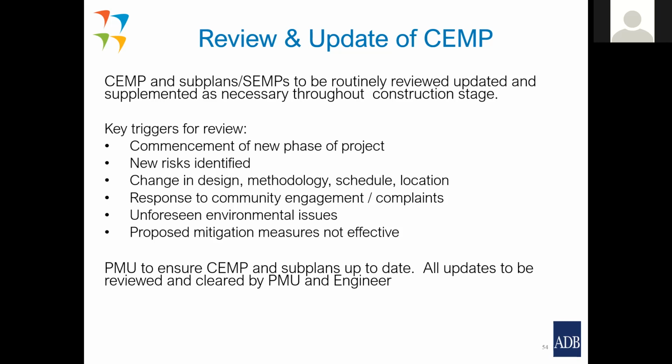So key triggers for a review of the CEMP would be commencement of a new phase of a project. New risks might be identified. Change in design methodology, schedule, change in location. This is what happens in construction. Things change. Could be a response to community engagement. It could be a noise complaint, a dust complaint, which might result in the need to change his strategy in terms of mitigation.